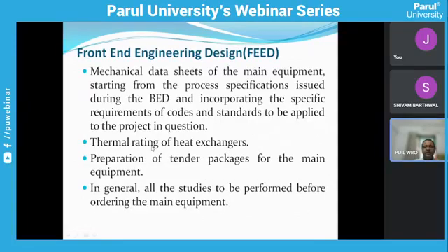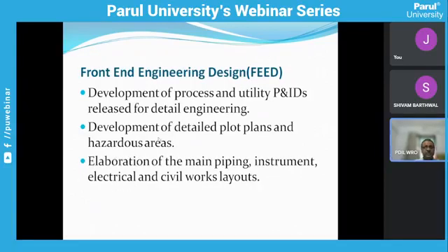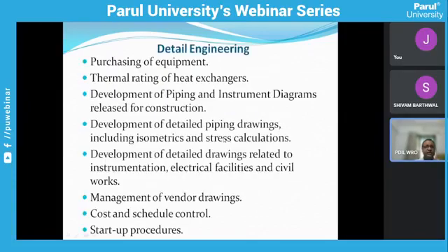And front-end engineering is mechanical data sheets of the main equipment, starting from the process specifications during the BED, and it is one step higher than the basic engineering design. Their scope is like this: they will develop these P&IDs, they will also do all these activities, and they will prepare everything which is required for a detailed engineering team. That means a contractor, an LSTK contractor.